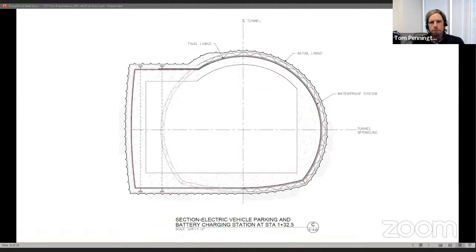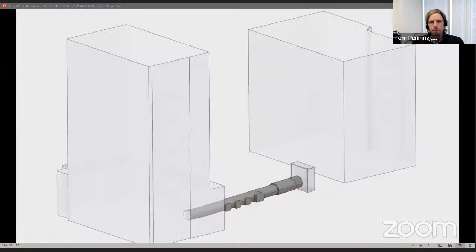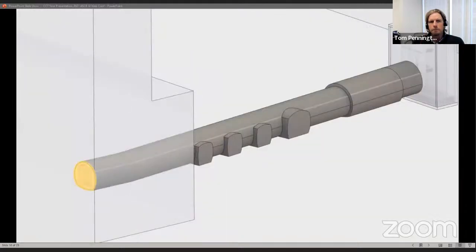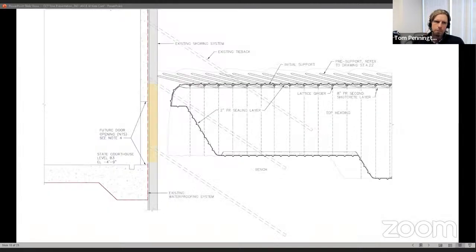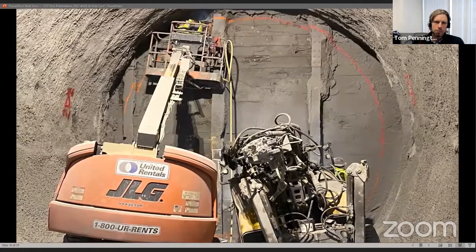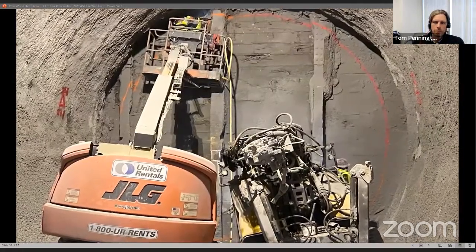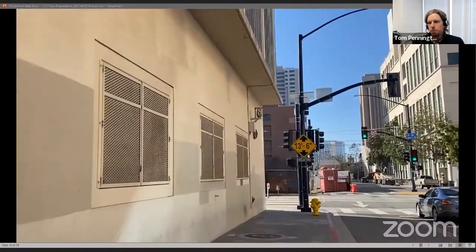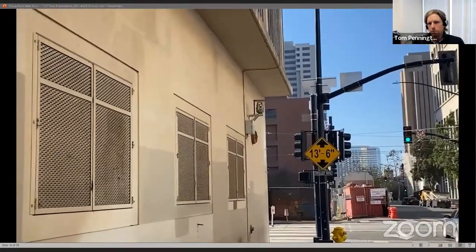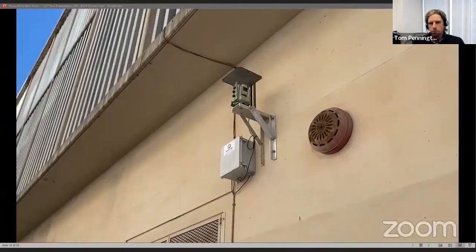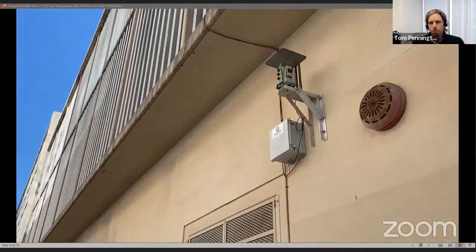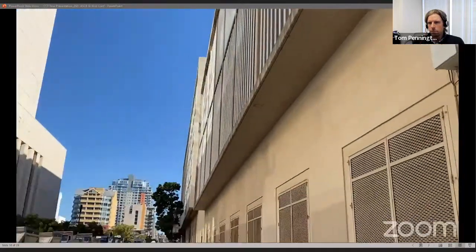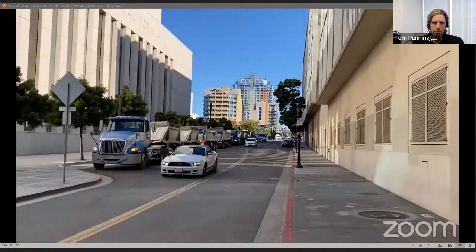Once the entire tunnel cross-section is advanced from the shaft to the courthouse, the break-in will be performed. This operation requires removing a portion of the existing concrete basement wall of the courthouse to connect the basement with the tunnel. During the construction of tunnel projects, particularly in urban settings, it is important to ensure no damage is done to surrounding infrastructure. For the Courthouse Commons project, this includes roadways, various underground utilities, and multiple buildings, 2 of which the tunnel traversed directly beneath.